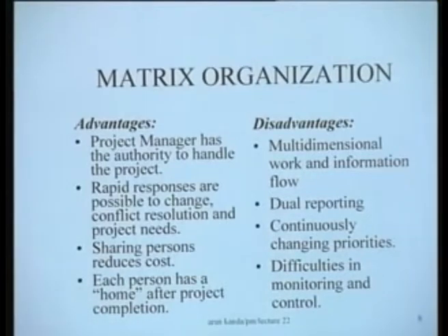But by and large, if an organization has to do a large number of projects, this becomes the best way of accommodating all of them together and doing projects together in the same fashion. So depending upon the needs, we can see that no organizational structure is actually an ideal one. But by and large, considering that you are in a particular environment where you have to handle multiple projects, probably the matrix organization structure would be the best answer.